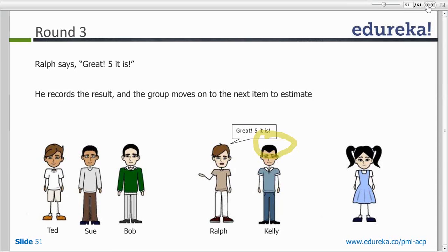Okay. Now there was this question by Mathur: for whom would the estimates be done? Mathur, does that answer your question? Since Kelly, the product owner, is involved at every stage, the estimate is done even for the client. So the estimates for the client and for the internal teams are the same. Because here you are not estimating the time, you are estimating the complexity. You might want to add some buffer when you go down to a time level, when you are going beyond complexities.